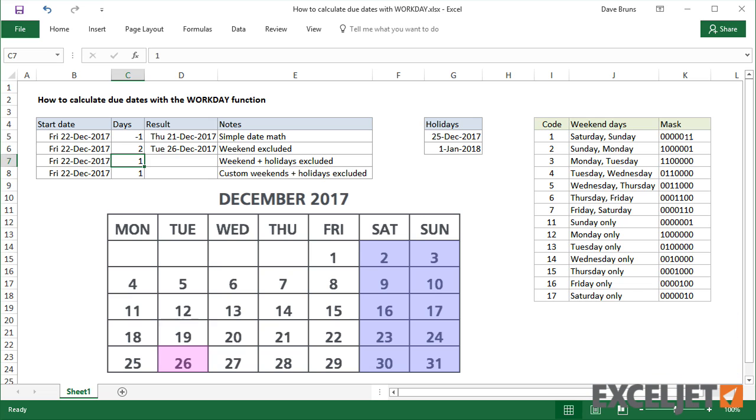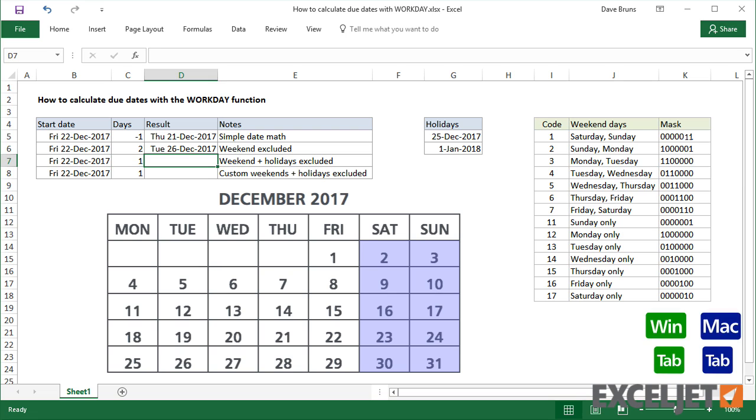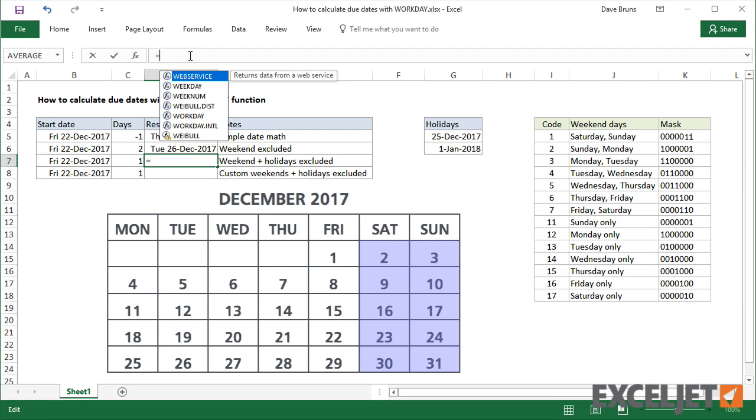If I change days to 2, we get December 26th. Now, December 25th is Christmas, so it wouldn't normally be treated as a Workday.